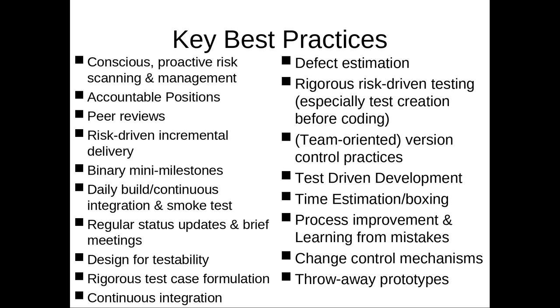By the way, you can see with incremental deliverable, particularly with continuous integration, if you've only taken a little bit of time to do this work, a fraction of a day, not much has changed with respect to other things. So the likelihood that your contribution will break with other things when it tries to play together will be lesser. But if you're working on something for weeks on end and then you check it in, there's more chance that it will run across purposes to other things that have been checked in since. So having that testing of it with the rest of the code base is good. Continuous integration and smoke test.